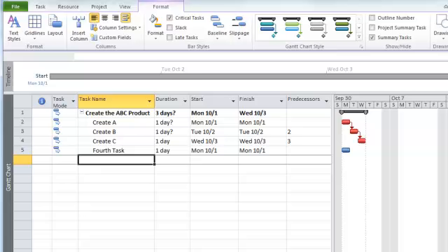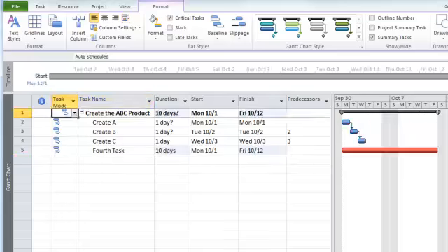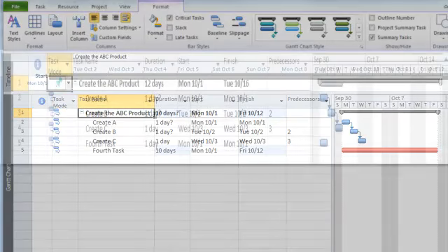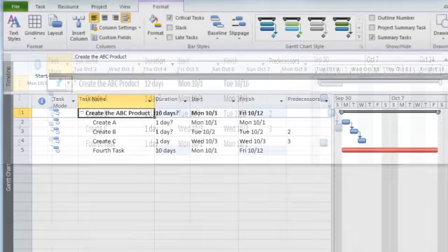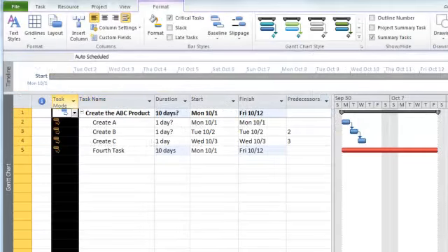Trust me, whether you are a beginner or advanced user, when you start using the outlining feature, you're going to have to remember to monitor the task mode column, as you will make this mistake accidentally and fall into the trap. So even though you may have taken all the precautions of setting the default task mode to automatic scheduling, and you don't go about intentionally creating manually scheduled tasks in your schedule, the trap of changing a summary task and changing one of its schedule columns and turning the summary task into a manually scheduling mode row is just an unfortunate thing that is going to occur. So as soon as you start to use the outlining feature in your schedules, you need to start watching for this trap.